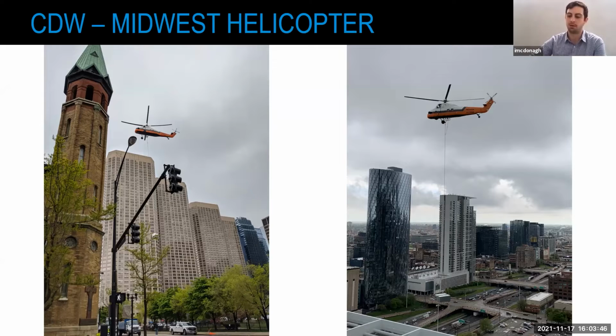So overall, we were bidding this thing out in February of 2020. Conversations started then between all the mechanical contractors. Hey, what is the most viable way to get this here that's within a reasonable cost? So conversations start then. Low bidder gets awarded. We talked back and forth for about 2 weeks in late February, early March. Landed on the helicopter lift plan, and from there they released the Midwest helicopter.